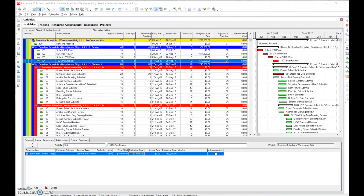Step 12 is reducing excess float. The definition of excess float is very relative — if you have a one-year project, excess float would mean 60 days of total float; however, if you have a one-month project, excess float would be five days. Float is the amount of spare time available before it affects the critical path, before it affects the longest path in the network.